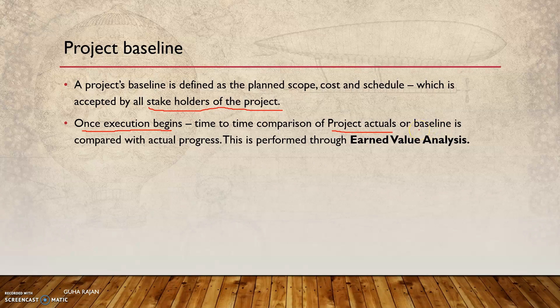The planned one is compared with the actual progress, and that is where if there are delays in the schedule or more resources are being used and there is a cost overrun, corrective action needs to be taken. This is performed through earned value analysis.